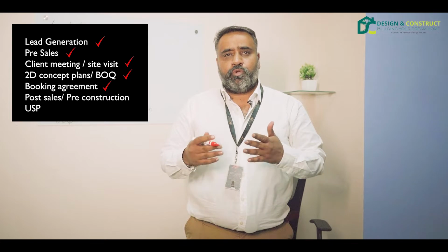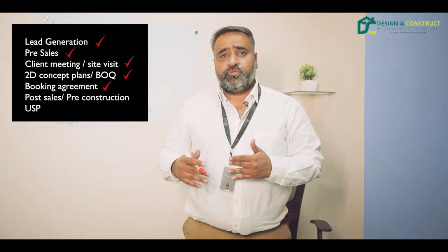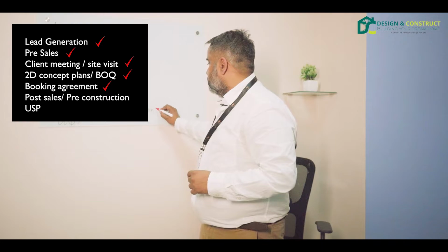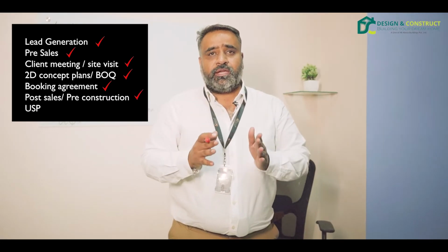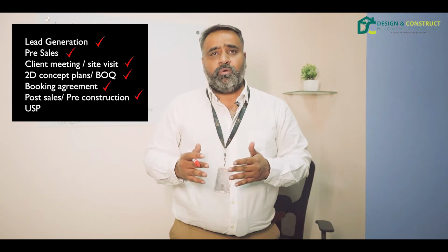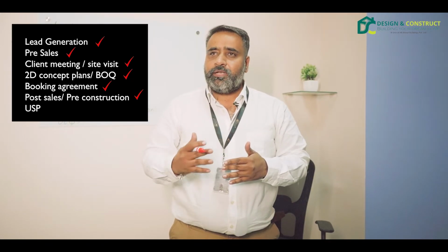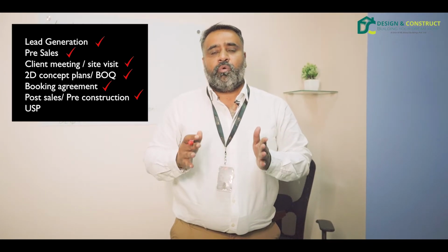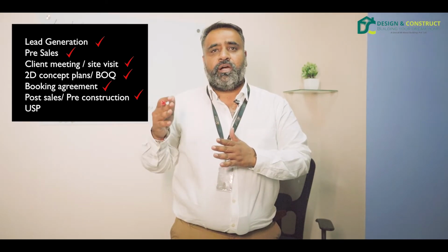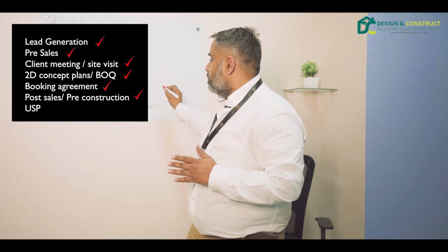Now that you've seen the booking agreement copy, we take the work further. It goes into pre-construction. That is also post-sales or pre-construction, you can call it anything. What happens in pre-construction is we do the exact concept plan for the client. The earlier plan submitted to him would be a concept 2D plan, but now we take the exact requirements of the client, work with the client, and give him unlimited iterations for the designs. Once he finalizes that, we also do a soil test at the site and a proper site survey is done.